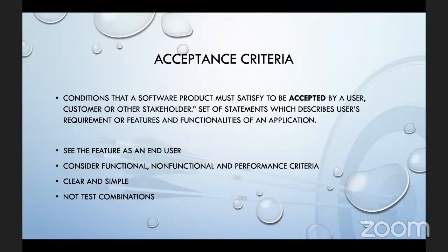For instance, like our ABC Church platform, where we talk about a donate button, the acceptance criteria will list all the things that we need to see when we go to the donate page. So number 1, or bullet 1, whatever you use: users will be presented with a set of options of programs or projects that they can support. Then you indent it and say 1, tithe, 2, offering, 3, maybe other projects around the world that they have out there. All those outreach projects and programs will be listed. This is something that we need to validate when we go onto that page.